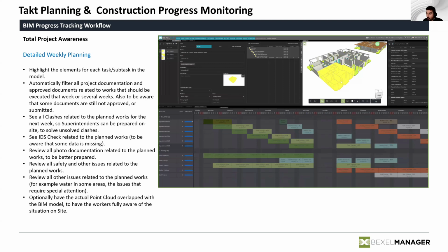In this case, the two teams that are doing this work, that are finish-to-start connected, would simply go and in our separate canvas subdivide these tasks into specific areas, in this case apartments, and simply say, okay, as soon as I complete, let's say, apartment number 1, I'm going to move my team to apartment number 2, and you can jump in with the doors in apartment number 1.